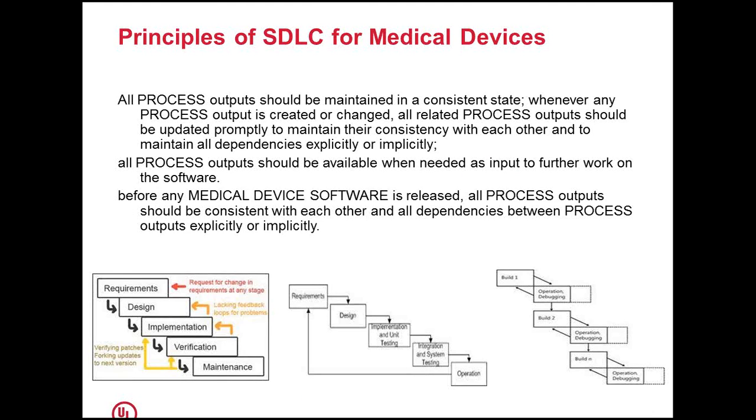Irrespective of the model used for development, there are certain principles to be followed for medical devices. The standard clearly specifies that all the outputs should be maintained in a consistent state. That is, whenever any process output is created or changed, all related outputs should be updated promptly to maintain their consistency with each other and to maintain all dependencies, explicitly or implicitly.